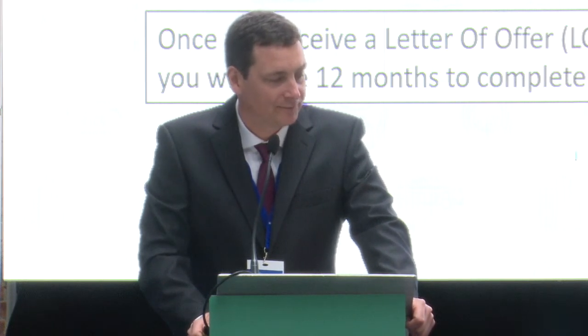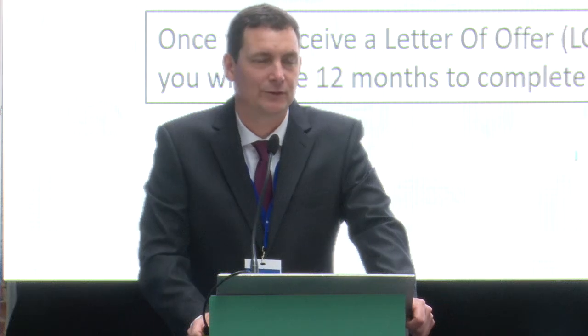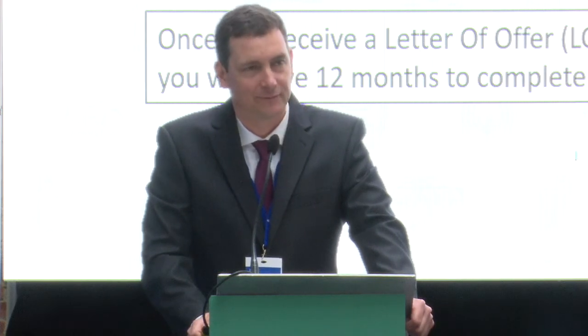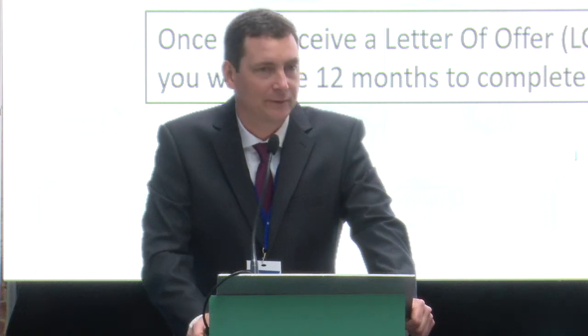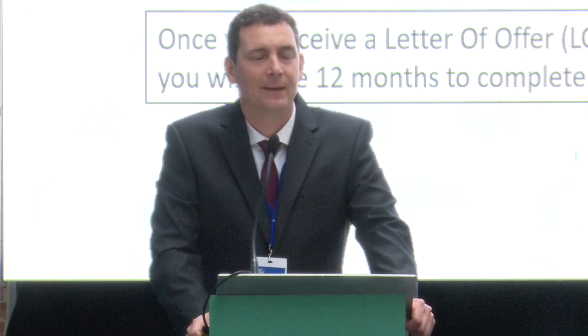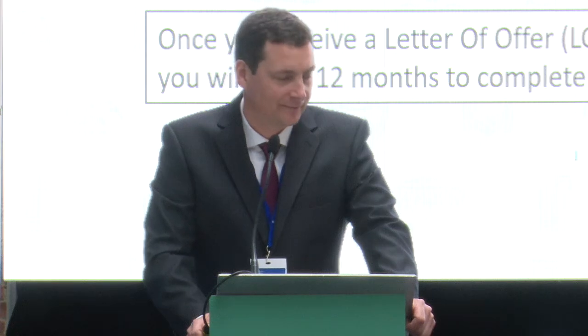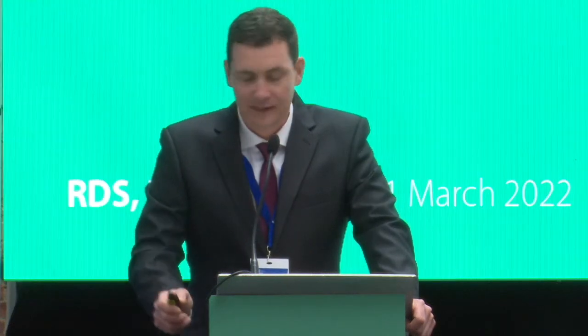Completion and inspection, allow about 2 months. So once you are about a month away from being ready to be inspected, you can contact us, inform us, arrange a date with the inspector. He'll come out, have a look at your system, read your meters and sign off. After that, 3 months later, you'll get a check. Well, it won't be a check, it'll be a payment transfer.